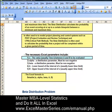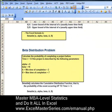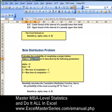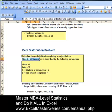There are five parameters in Excel. The first one is X, the value being evaluated at. The problem reads: calculate the probability that the project will be completed by time t equals 5, so in this case X is set to 5. The Excel formula only calculates the cumulative distribution function — that is, the probability of the event occurring up to time equals 5.